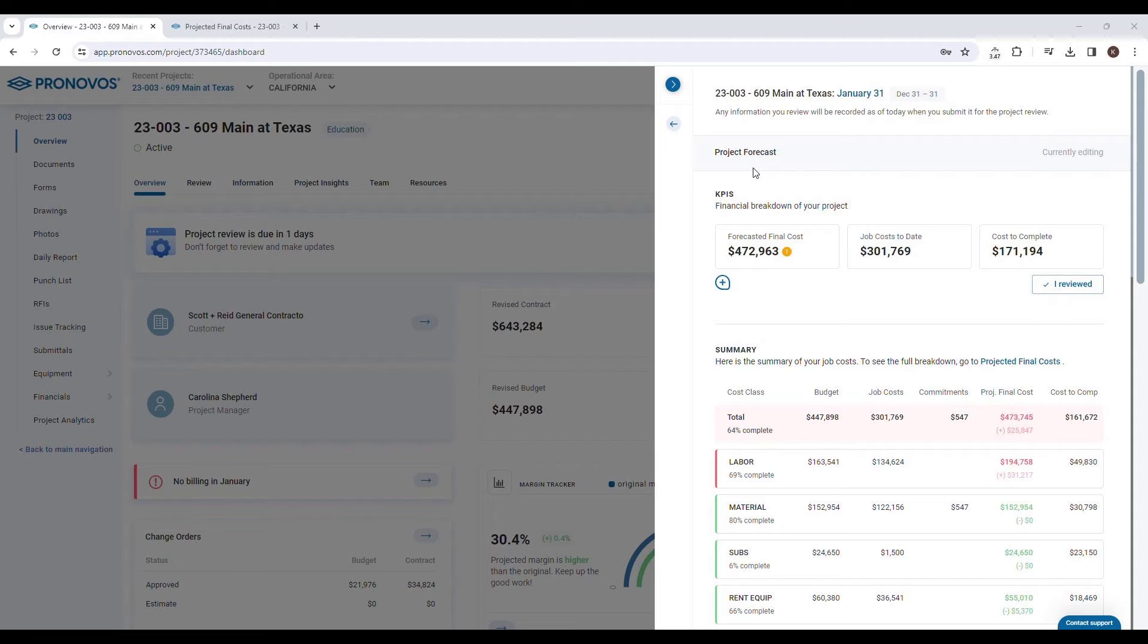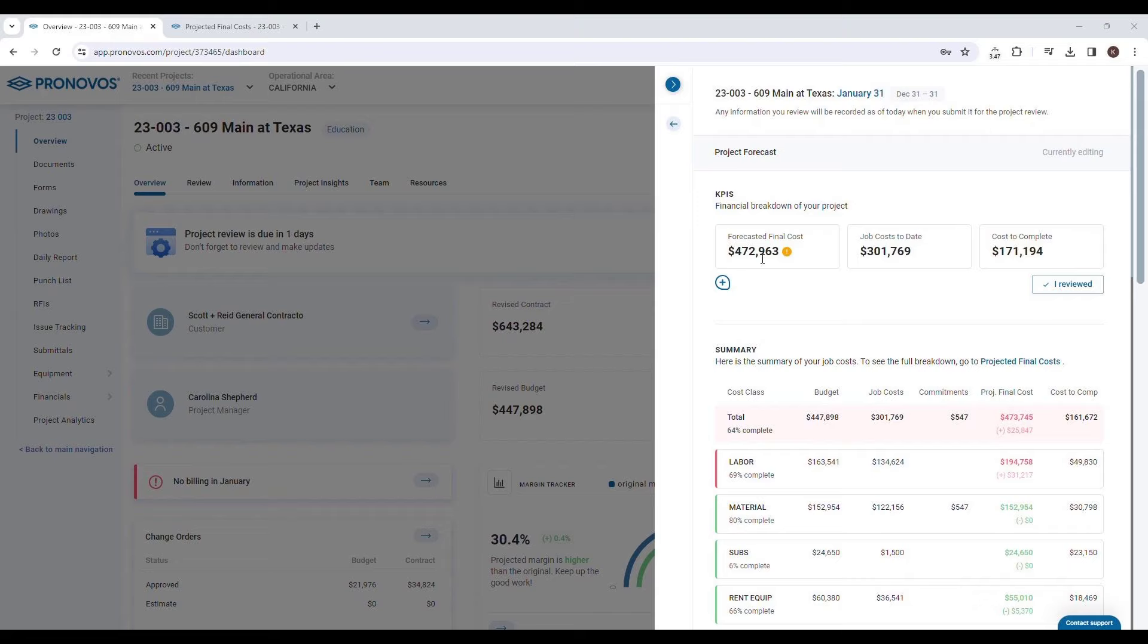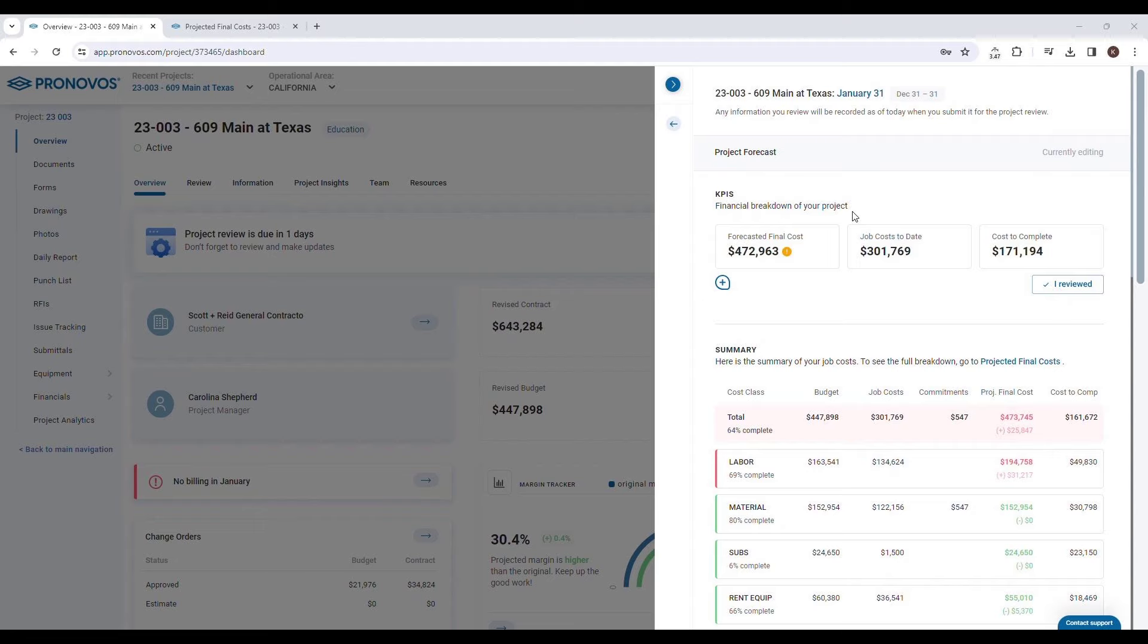The forecasted final cost pulls directly from Pronovos's projected final costs tool. This ensures that your forecast is not only precise but also reflective of the latest project adjustments. An accurate forecast is essential not just for understanding the total cost and potential profitability of your project, but also for ensuring that revenue is recognized at the correct pace.